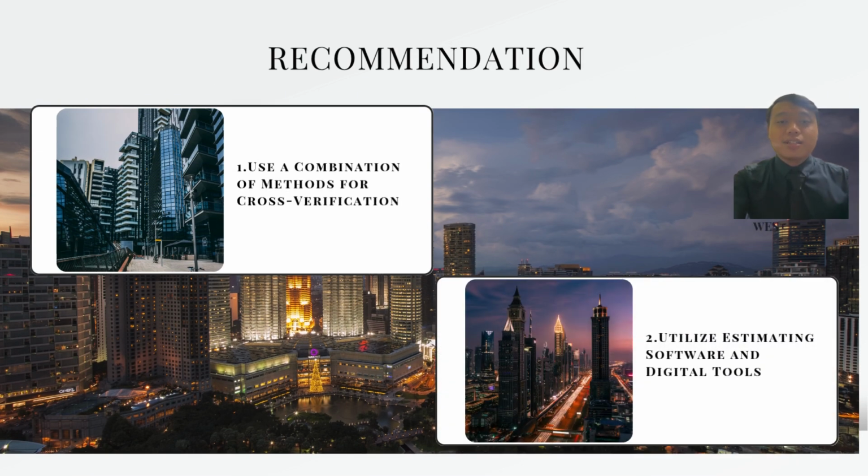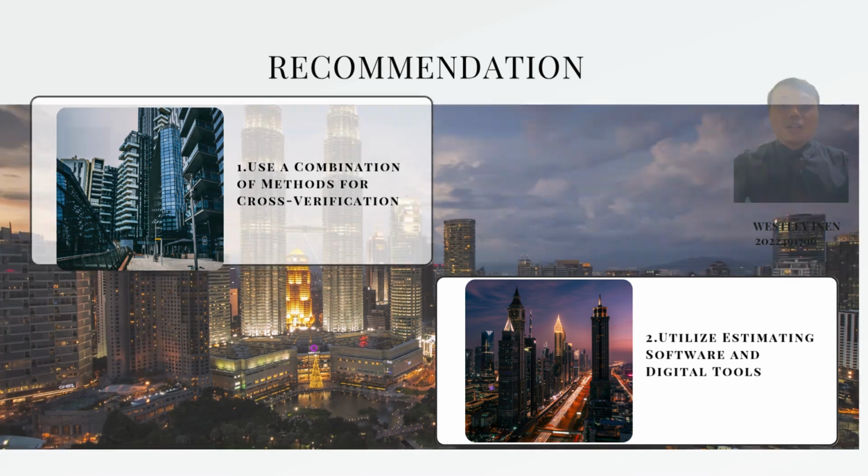There are two recommendations in this topic. Number one is use a combination of methods for cross verification to improve the accuracy and reliability of cost estimates. By comparing results from different methods, one can identify inconsistencies, validate assumptions, and reduce the risk of error. Number two is utilize estimating software and digital tools. Adopt modern estimating software to enhance speed, automate calculations, and improve estimate consistency through data integration.